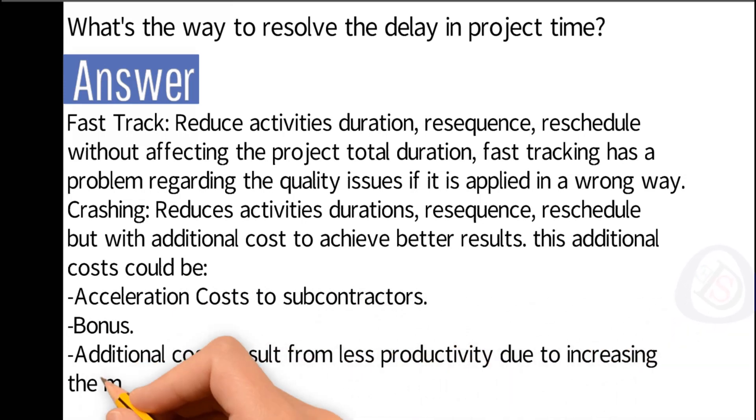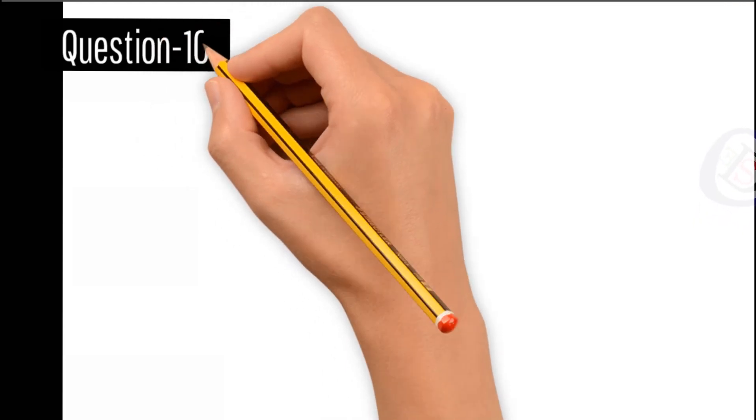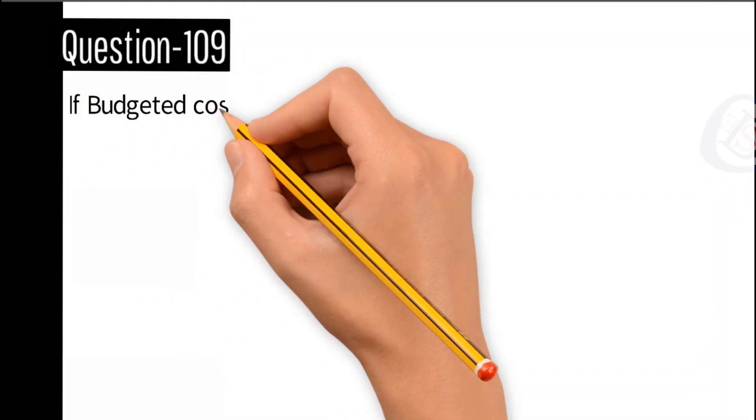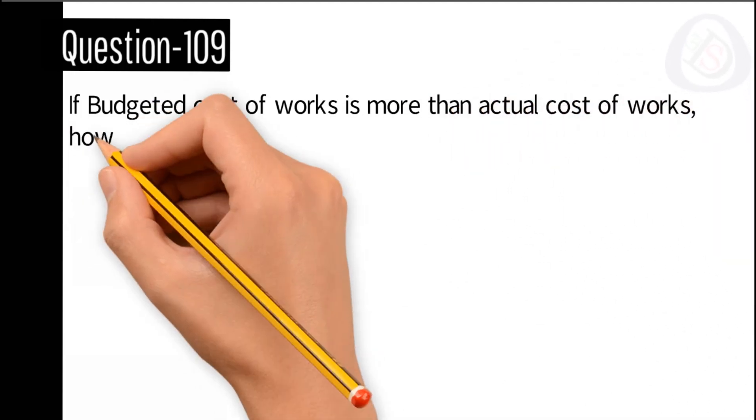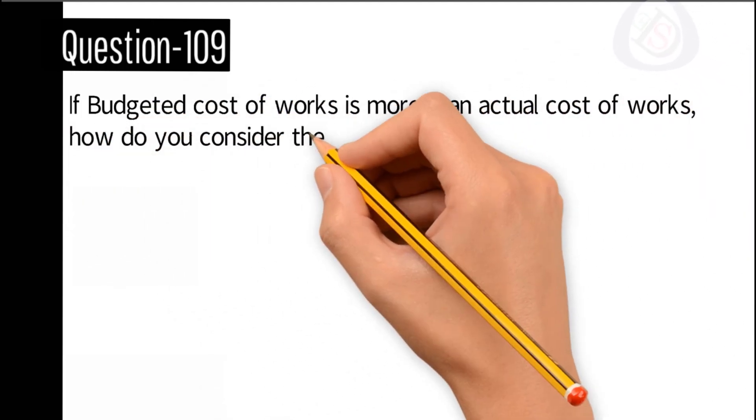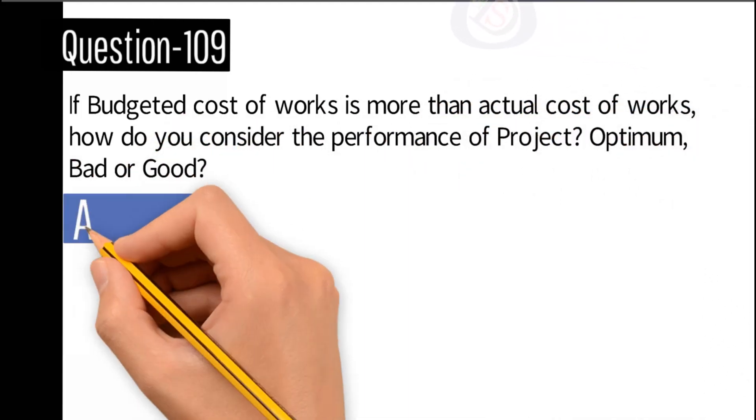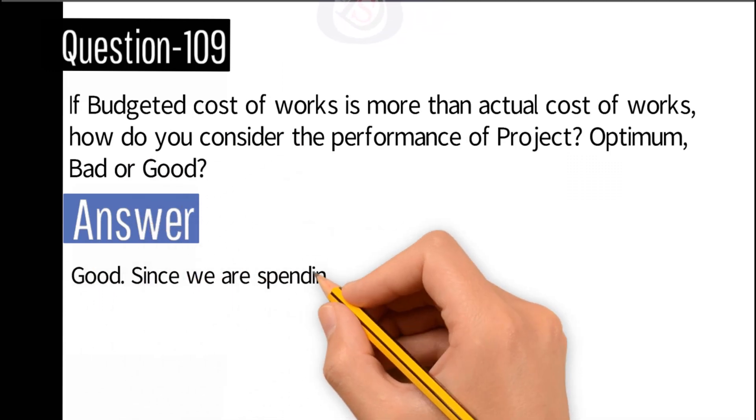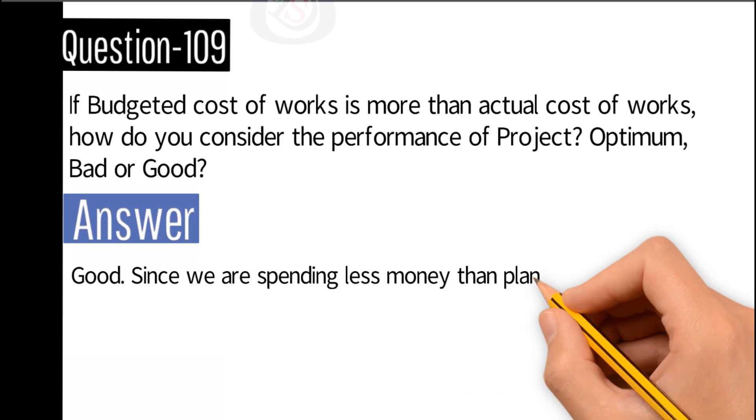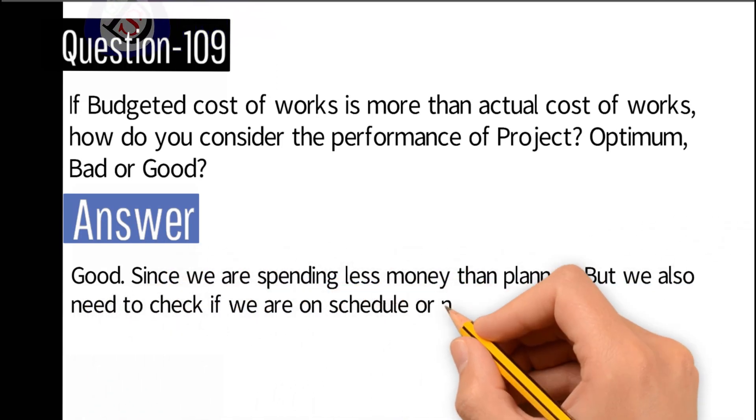Question number 109: If budgeted cost of works is more than actual cost of works, how do you consider the performance of the project? Optimum, bad, or good? Answer: Good, since we are spending less money than planned, but we also need to check if we are on schedule or not.